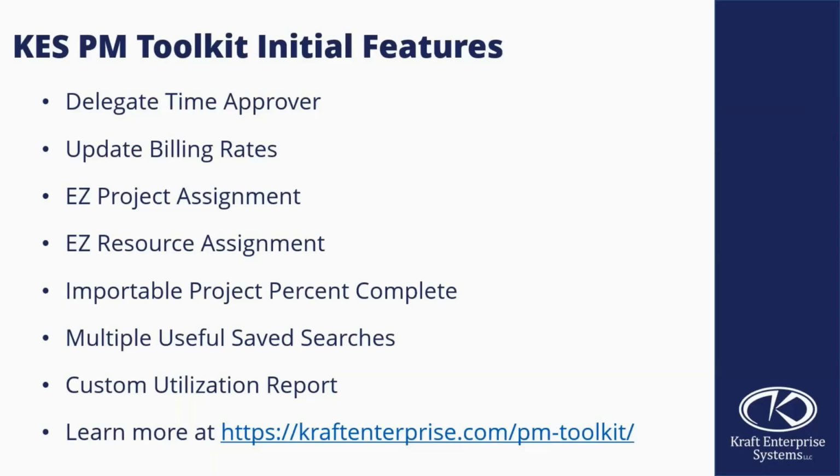For those of you that are using Project RevRec and using project percent complete for RevRec, often people don't use the NetSuite calculations for percent complete. Maybe they're using an external PSA and just bringing in results, or maybe even within the system they don't use the calculations NetSuite does. There's a percent complete override with NetSuite project management, but there's no direct way to import into that, so you had to manually update project percent complete each month for all your projects.